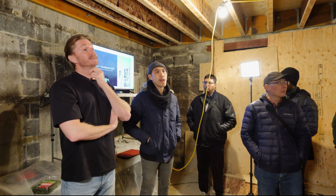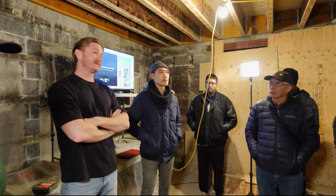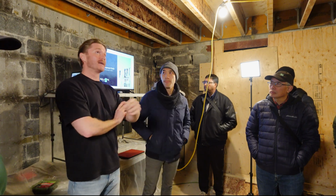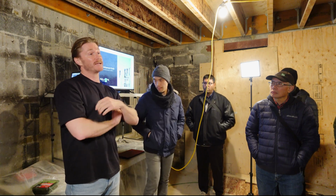So do you want to know the macro numbers on this project? Yeah, like do you get back 20% of your money, 50%, 75%? It depends. High level, it depends on construction costs. I'll give you the macro on this project. We bought the land for $1 million. Construction was about 1.5 to 1.7, so we're in for 2.7. We got it appraised at 3.7. We raised 1.2, and I think on this project we should be able to take out between 45 and 65% of the equity upon stabilization. And then all capital should be returned either through rental proceeds or the second refinance in 5 years.